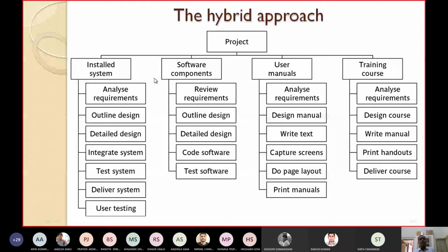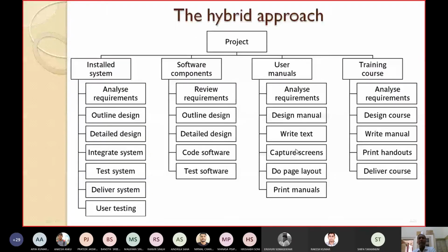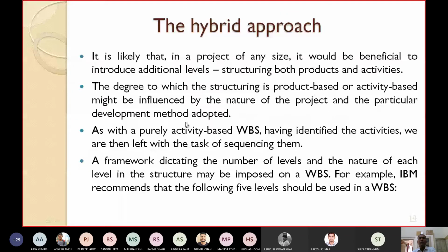I have already told you that in a project of any size, it would be very beneficial to introduce some additional levels, structuring both products and activities, not only the products, but also identifying the activities at the next level. The degree to which the structuring is product-based or activity-based might be influenced by the nature of the project and the particular development method adopted.